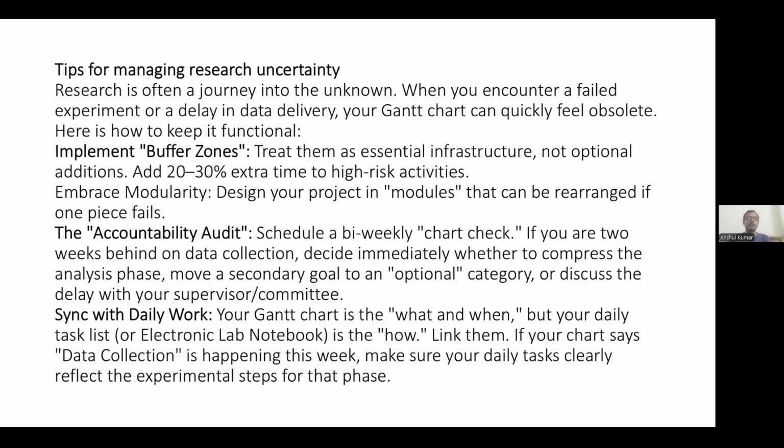Embrace modularity. Design the project in modules so that the project can survive if one piece fails. The accountability audit: schedule a bi-weekly chart check. If we are 2 weeks behind on data collection, decide immediately whether to compress the analysis phase, move a secondary goal to an optional category, or discuss the delays with our supervisors or committee.